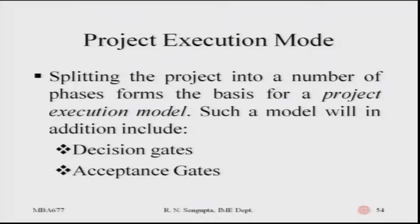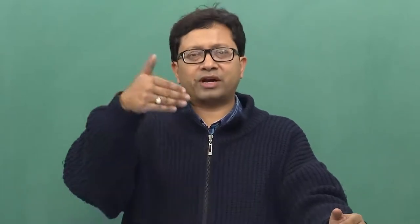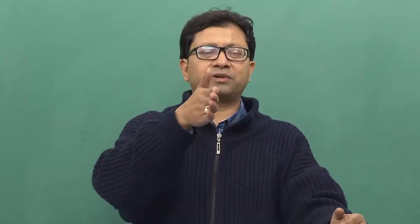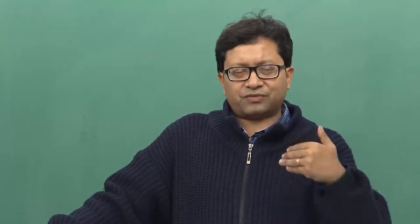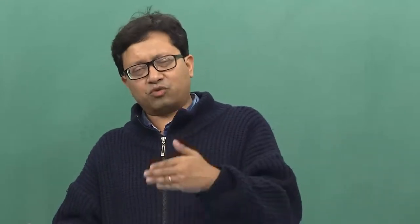Such a model will additionally have decision gates — points where you make a decision at a given stage: whether to go ahead to the next phase, what the cost implications are, whether they are too high or too low, and whether to bring in different technologies. Once the decision is made, you will have an acceptance gate where you decide to proceed to the next phase, hire different people, or offload machining work to a different company.